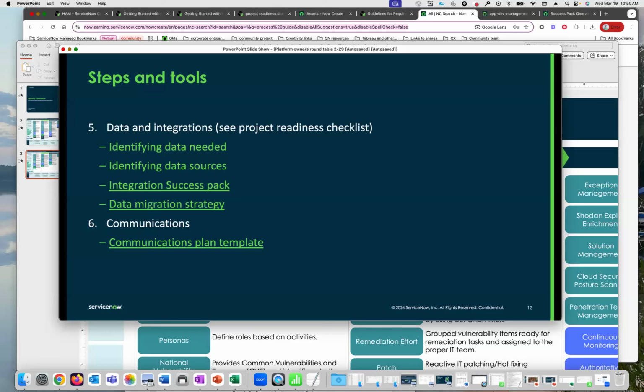We really do try to get the systems we're consuming from to at least give us a data dictionary, something like that, so at least we know what's available. But the things that have slowed us down the most turn out to be just getting the two systems to connect, getting the information sharing agreements in place, and the interconnections themselves.